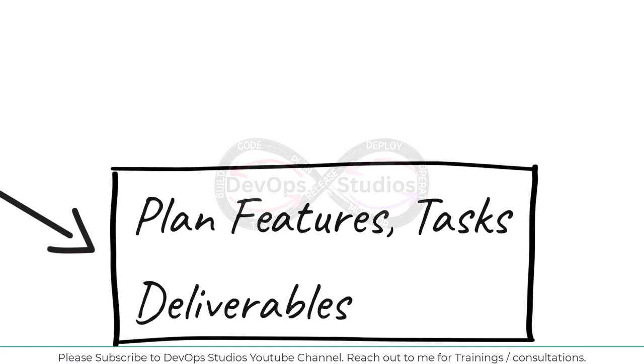A quick example is a feature like login. A user login could be broken down into tasks like designing the UI, creating a database schema, and developing the authentication logic. So now you have a feature and you have broken it into several user stories, right? The tools used for this part are agile tools to maintain a prioritized list of tasks, and you have to decompose the deliverables into smaller components, which we call work breakdown structures. So we have to create backlogs, and we have to use work breakdown structures.